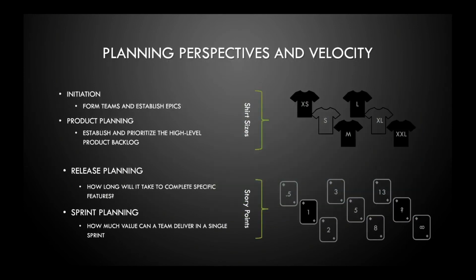During the initiation and planning stages, the vision is established, teams are formed, and the high-level product backlog is created. At this stage, product backlog items are essentially large user stories that can span an entire release or many months. Typically, a roadmap is created that aligns high-level product backlog items with strategic goals. Project boundaries are usually defined by one of two major constraints: strategic date targets or budget limitations.